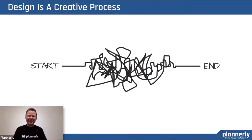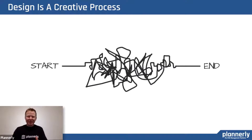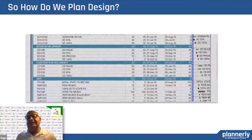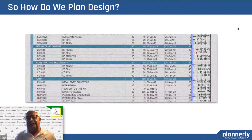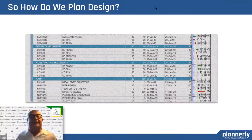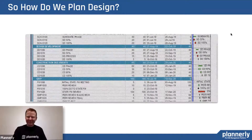It's more like this. Design is a crazy iterative process that goes round and round in loops that you can't really predict most of the time because of change, and that affects a lot of rework — it can be quite a complex process. It kind of looks like a spaghetti diagram. The problem is the design manager, or the contractor if it's a design-build, has put a line in the schedule that says 50% DD is going to be done on September 24th, period — it must be done. And life isn't like that.